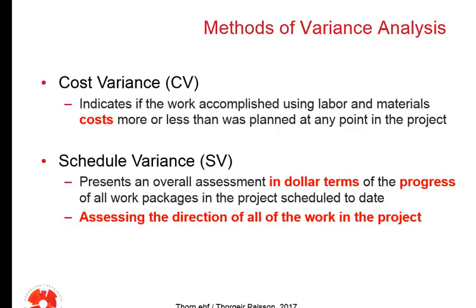We don't know how much, but we know that the dollar term says that we are running behind schedule. If it is positive, then we are actually ahead of schedule. But we need to know in real-time units. It's not enough to know just that we are behind schedule or ahead of schedule. We need to know exactly, are we 1 month ahead or 2 months or one time unit? And how can we know that?